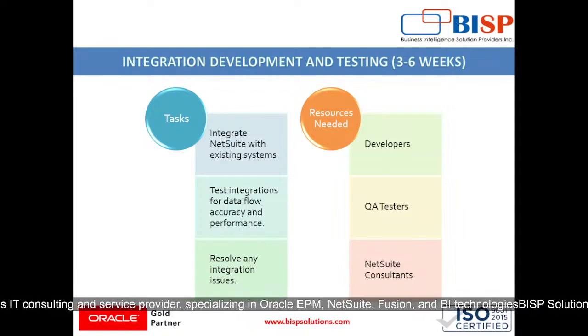Then integration development and testing, so it will take around 3 to 6 weeks. So tasks involved are integrating NetSuite with existing systems and testing integrations for data flow, accuracy, and performance, and resolving any integration issues. So resources needed are developers, QA testers, and NetSuite consultants.